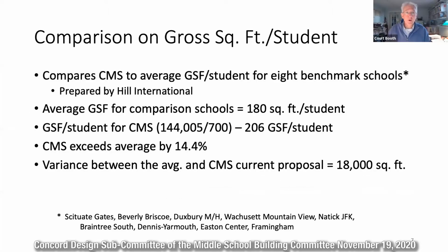So now we go back to gross square footage. And this is where we looked at information that Andy and Mike's team had given us in the way of a pretty big spreadsheet last March. I'm not sure I ever got my head around it back then, but we tried to this time. And we looked at those 8, which are noted on the bottom here. Mike, I'm sure you can get us that spreadsheet again if anybody needs it. This is where we looked at an average of 180 and looked at the treetop design as a current 206.